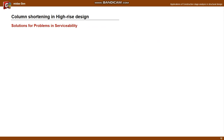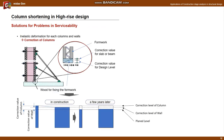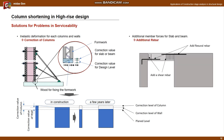So what is the solution for differential shortening? The serviceability problem is solved through correction when pouring columns and walls. The pouring level of the vertical member is corrected so that the final shortening reaches the planned level and has a similar level for each vertical member. For this, it is important to calculate the correction value exactly. If the predicted shortening does not occur after correction, problems may arise due to correction.